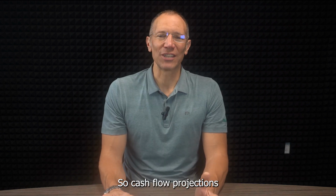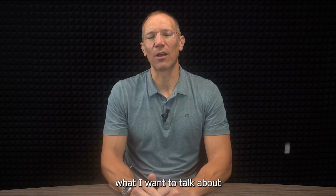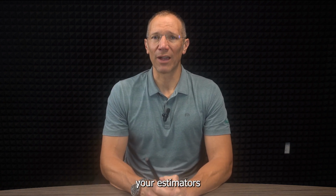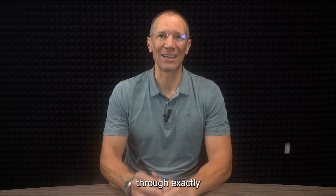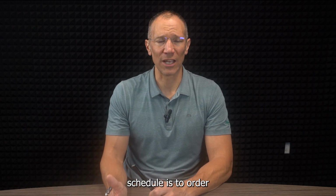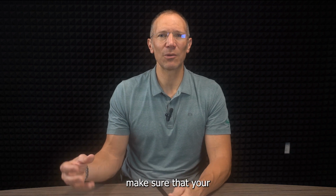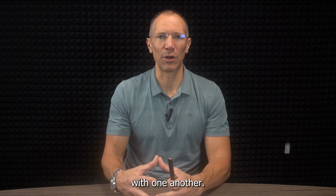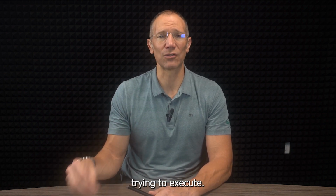So cash flow projections and budgeting are a critical item. We've discussed that already, but here's what I want to talk about from a project manager perspective. Your accounting team, your estimators, include your project manager with them. Walk your project manager through exactly how you've budgeted this project, how much labor, what the schedule is to order material, how much material will be on site. Make sure that your project manager, the estimators, and the accounting team are all communicating with one another, so at the start of the project, you know what the plan is that they're trying to execute.